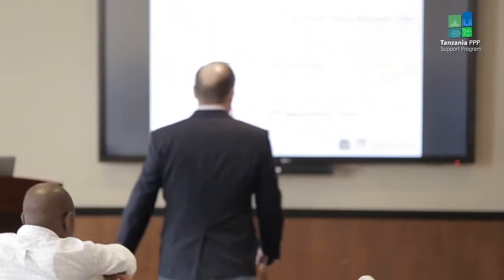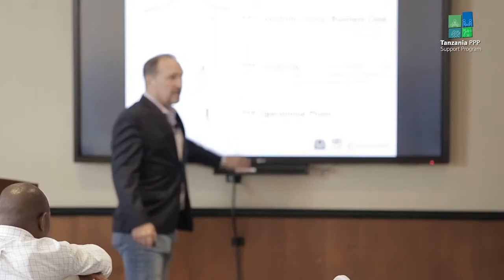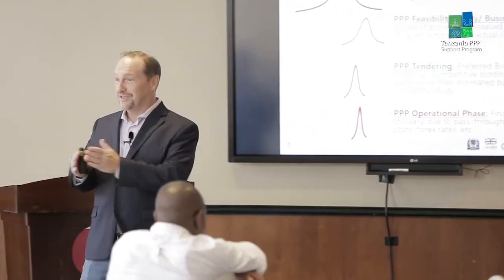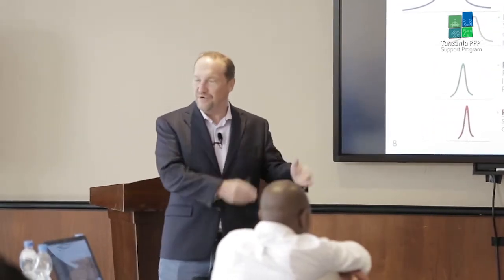Pretty broad. By the time you get to the feasibility study phase, governments may say, no, we're actually going to do that on a monthly basis, so much more detailed. You'll find that even lenders who have a good deal at risk may do their own analysis and come up with one that is actually done on a weekly basis. So throughout the 20-year term of the project, there's actually costs identified per week, much more level of detail.